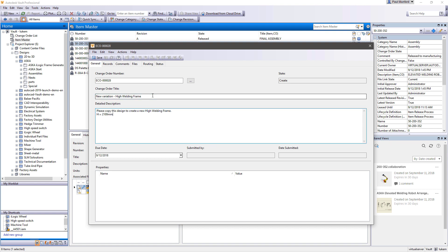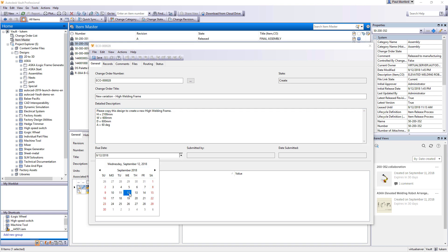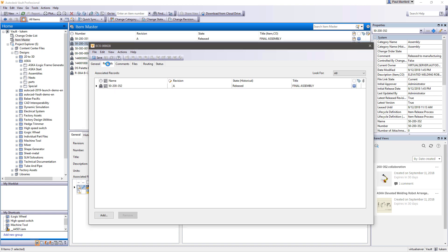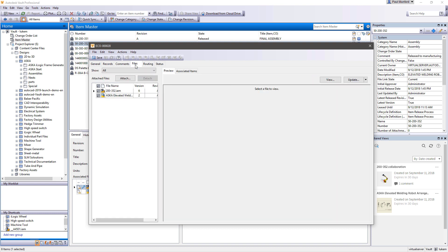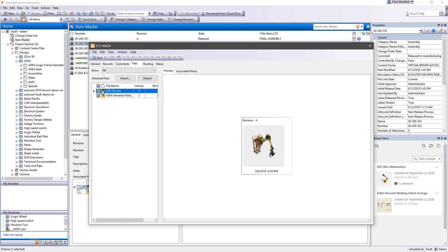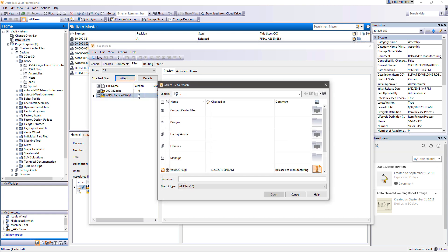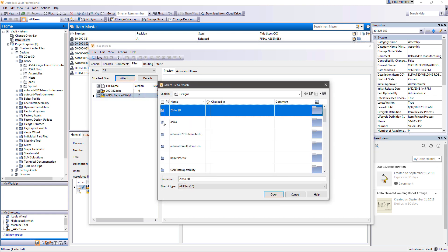You provide a change order title, description and due date. During the change order process, the design documentation is referenced and additional documents can be attached. Comments can be added and progress is captured automatically.